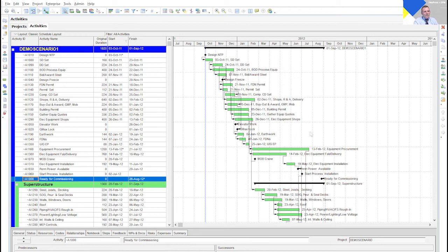And are those activity IDs auto-generated? Yeah, so because NetPoint does not require an activity to have IDs, if you do not have activity IDs, they will be automatically generated for you, similar to how the default P6 IDs generate, or you can actually set them. But if you have actual IDs specified in your NetPoint schedule, then those IDs are the ones that will transfer over to P6.